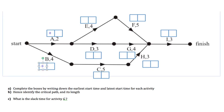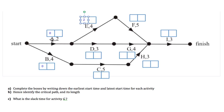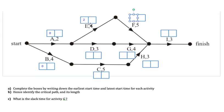Likewise, Activity B comes from the start, so its earliest start time is zero. Activity E has to wait for Activity A to finish, so its earliest start time is two, because A has a duration of two. Activity F, following this path a bit further, has to wait for E to finish. If E can start at two and E takes four, then F will be able to start at six.